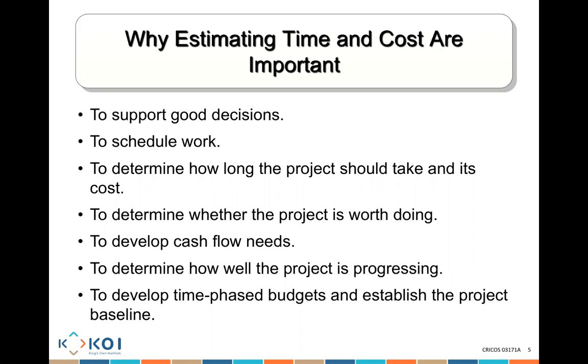We plan because we're going to try to create a cash flow. So if I create an estimate of the costs across every single work package, and I know when it's going to start and when it's going to end, I know, okay, for this specific stage of the project, I'm going to need 50,000. For this stage, I'm going to need 100,000. For this stage, I'm going to need 200,000. And you start monitoring how much it is costing you versus how much you planned it was going to cost you through a plan.